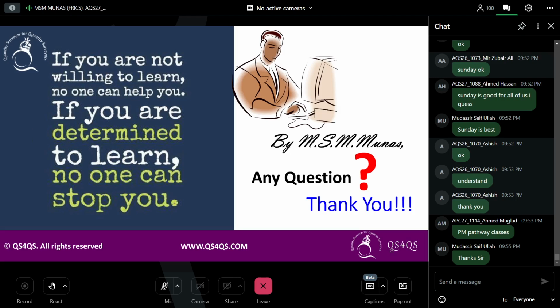Normally, what will happen is they will agree the timeline, whether the contractor or the employer is insuring. Ultimately the employer is the one paying this. Once you have handed over the project to the employer, asking for insurance for that handed over part is useless from the contractor. So generally they agree that after the taking over certificate is issued, the employer will take the insurance. This is the normal arrangement.